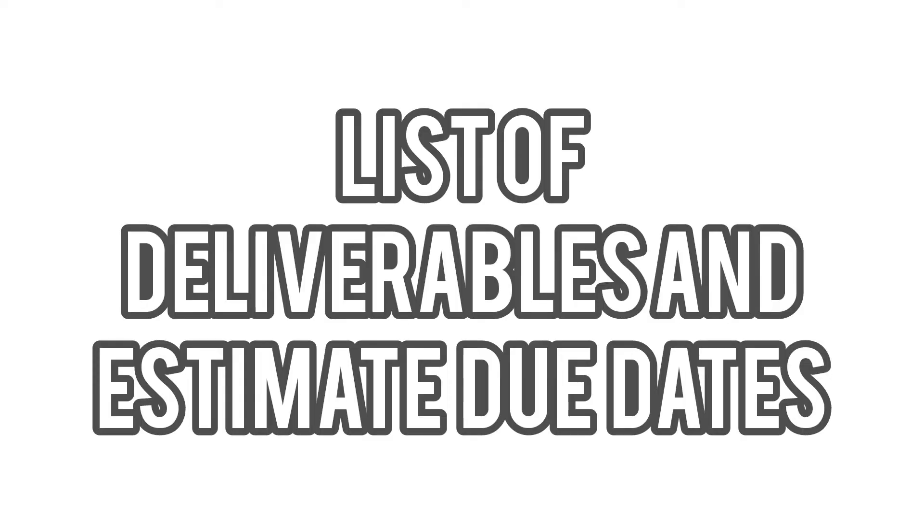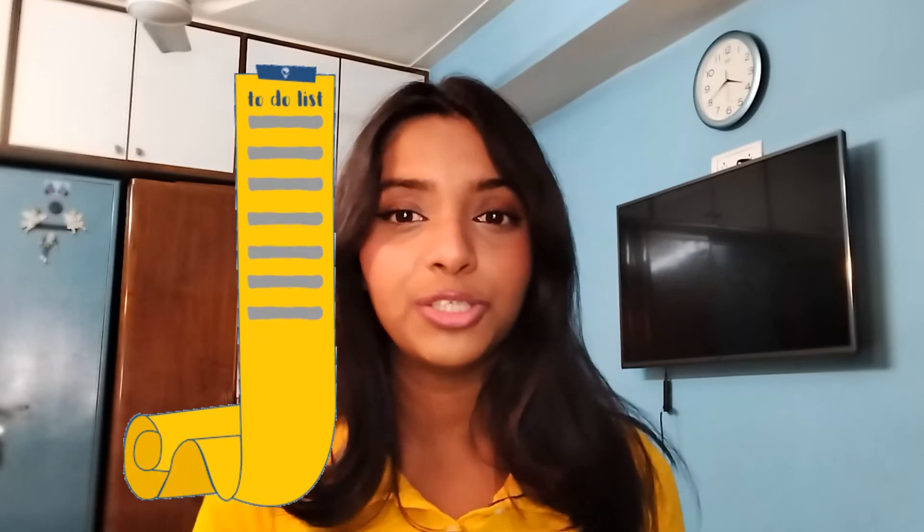4. List of Deliverables and Estimated Due Dates. From the preparation of the project scope statement, you should now have a clearer idea of the deliverables and the outcomes to be delivered to complete this project. From there, you should list out what tasks and deliverables each member is expected to produce and when.